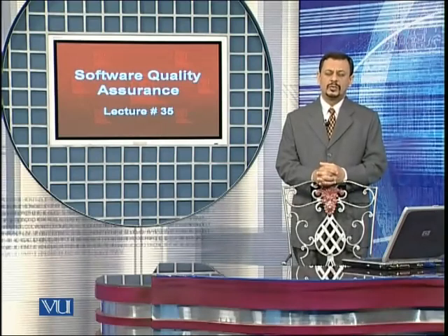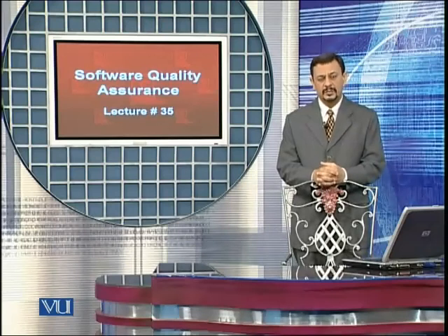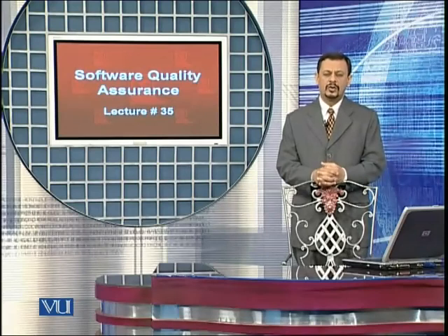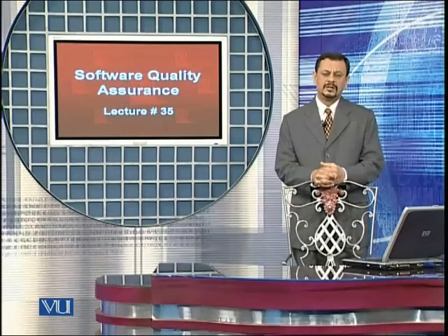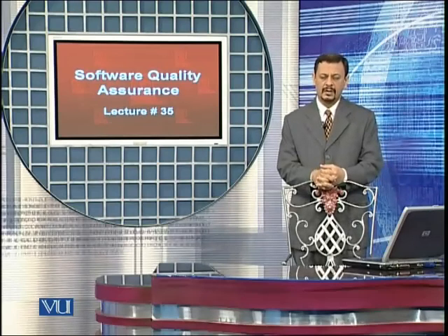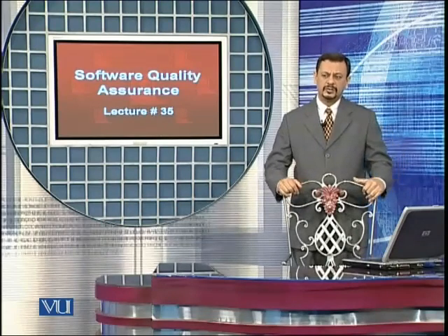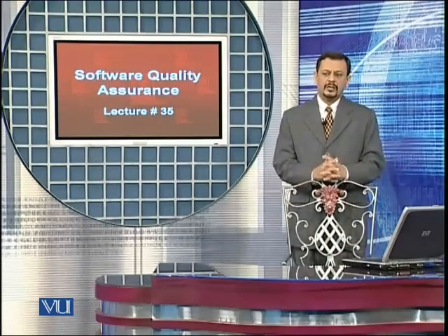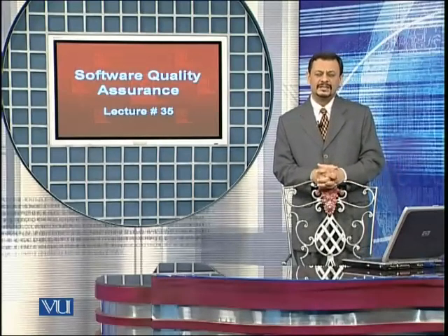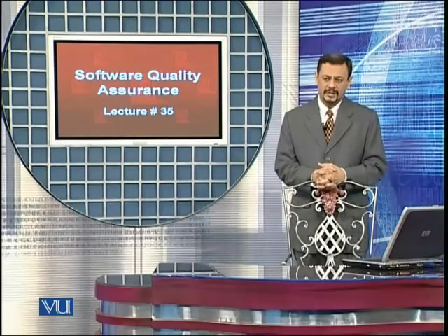The change control process for those work products which have not been baselined is fairly informal, and not a lot of approvals are required to make necessary changes. In the first lecture on software configuration management, we talked about the fact that SCM provides a cover against lack of visibility and lack of traceability.